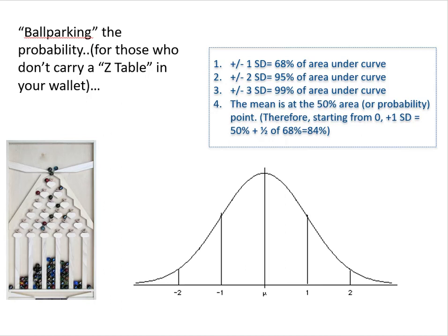Returning to our normal curve, it may require a bit of a conceptual leap to get the idea of converting units of time into numbers of standard deviations. Again, this is something you can only do with PERT, not with CPM. The reason you can is because every activity duration is a weighted average composed of best case, worst case, and most likely. Therefore, the overall project duration is a mean. It falls in the midpoint of the curve.